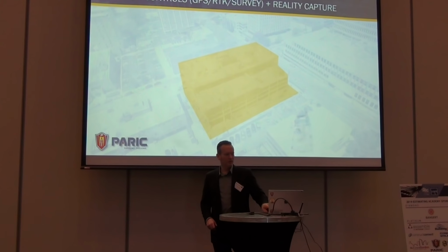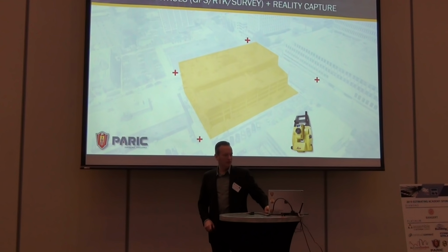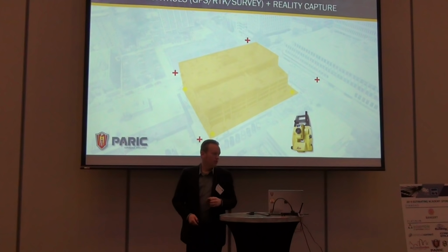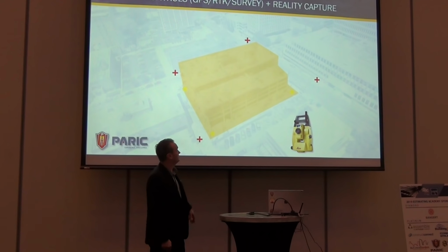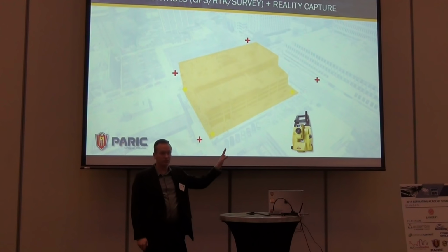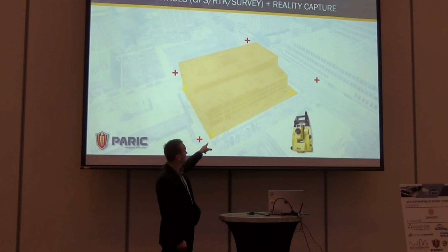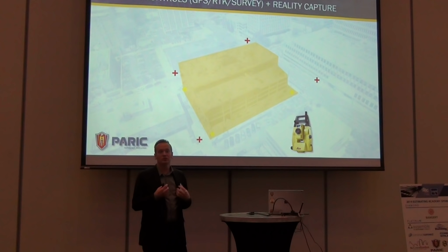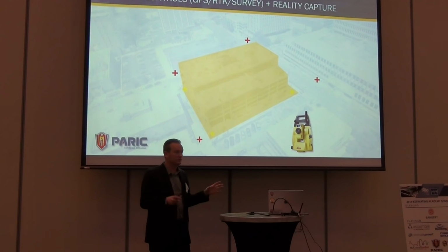So to make all that work, let's check ahead here a little bit. There are several different types of control on a project. You have your basic control of where you are in the world, and that typically comes from our surveyors. We have our site control, which are the yellow dots, the control that we start to set up for our projects so we can reference this information.